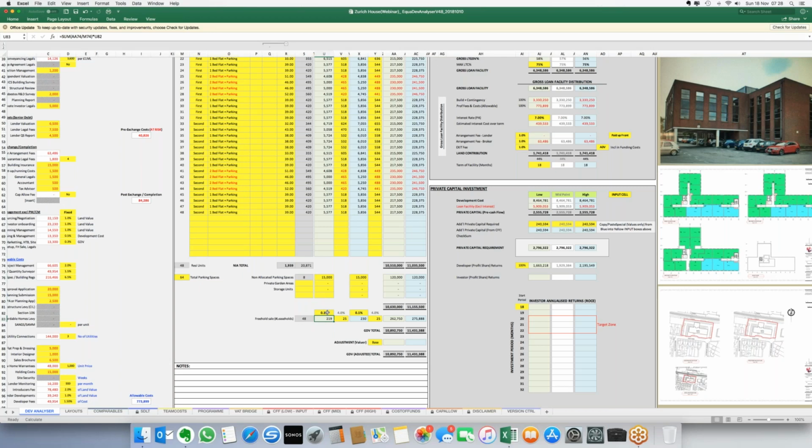So nationwide at the moment, and a few other lenders as well, have limited the ground rent of properties that they will support to 0.1% of the purchase price. So, to cover the base across all of these flats, we've gone down that rationale. So 0.1% of the average of all the flats, that's 10.510 million divided by 43 times 0.1% is 219 on the low.